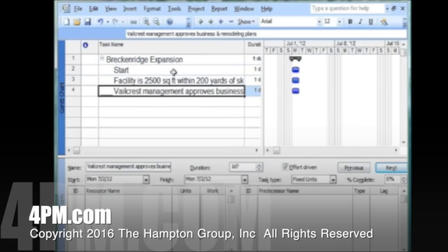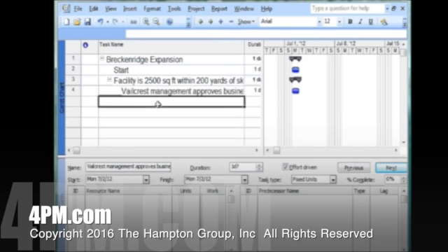We indent the sub-achievement one place. And as you can see, the software has made our first HLA in line number 3 a summary task. When we enter the second sub-achievement, the software will continue the previous indentation. So we'll continue and enter the rest of the sub-achievements.